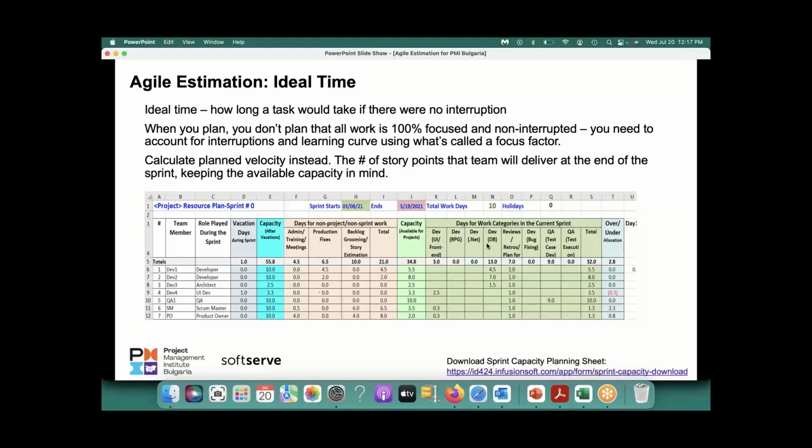engagement where a team had implemented Agile. They were doing 4-week sprints, but they would miss stories in every sprint. Whatever they said, they were not able to finish. So if they were not able to finish, then what happens? Guess what? They have to roll it to the next one, and that was not just the issue. They would work with their salespeople, and salespeople would go and make a commitment to the customer, and they would say, okay, next month you will get that, month after that you will get that, and so on and so forth. But then they were not able to keep up the commitment because of the issue.